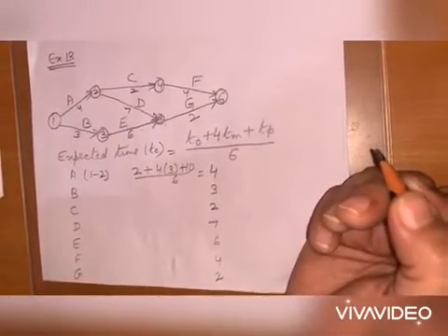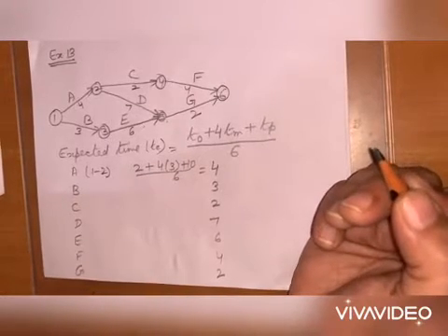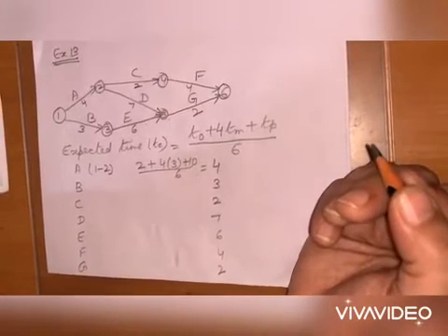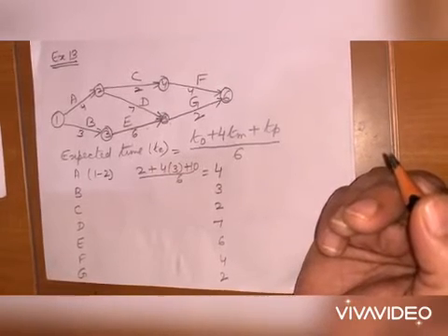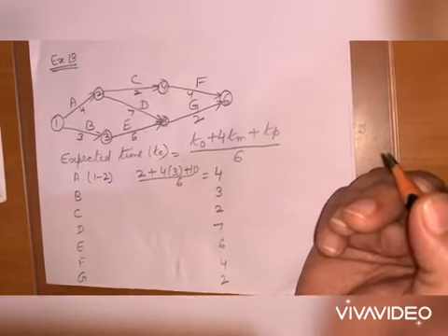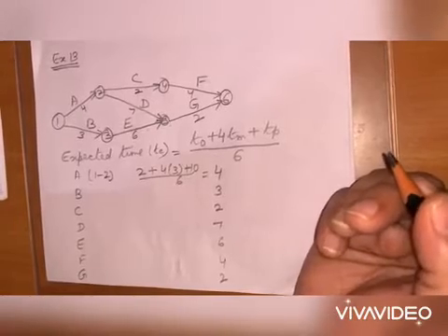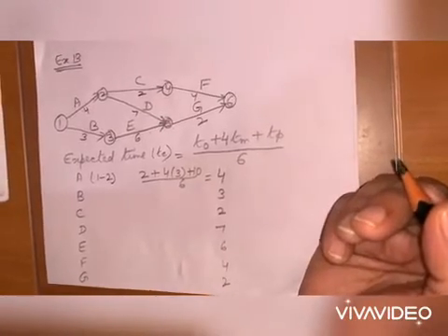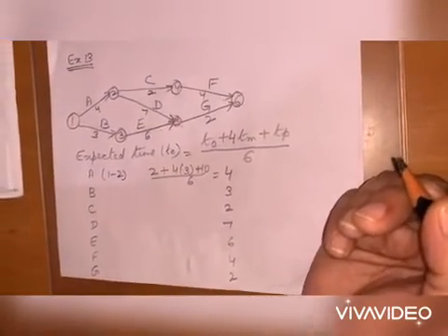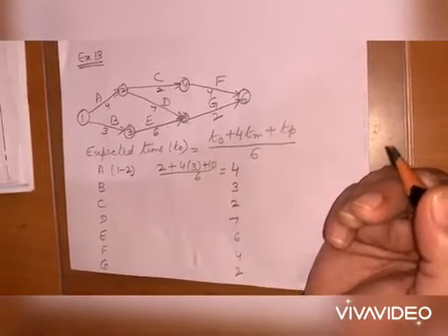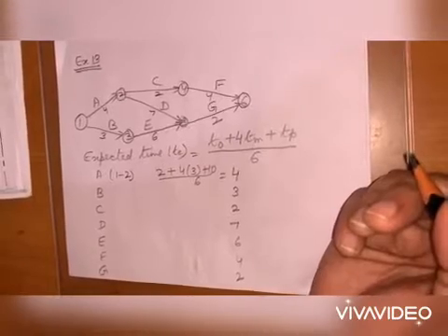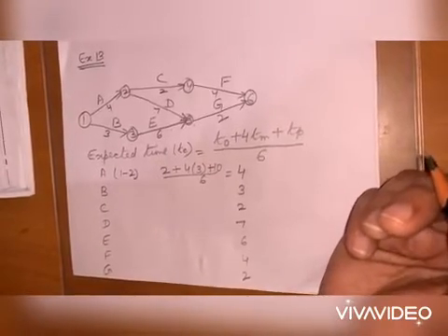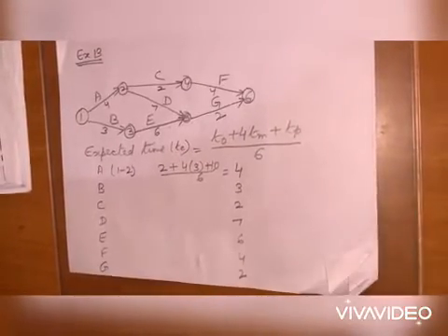There are different ways. I will teach you only one method today. What is the critical path? Critical path is the longest path in the network, and identifying the critical path is very important as it determines the duration of the entire project. If any activity on critical path is delayed, the entire project will be delayed. So what is the critical path? Longest path.